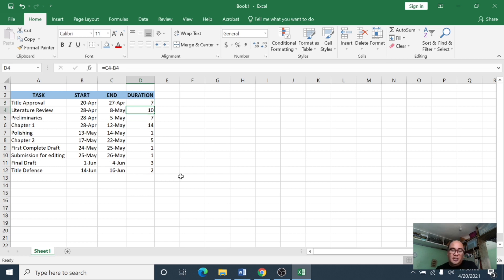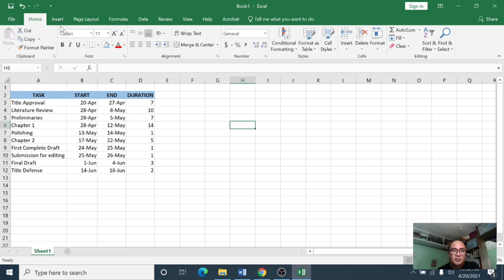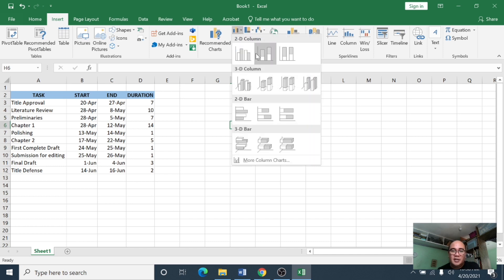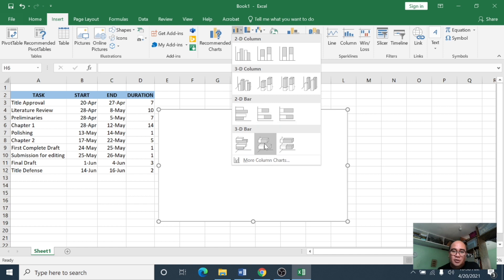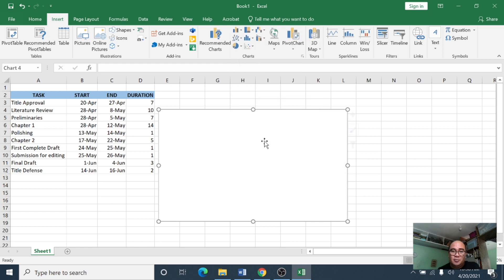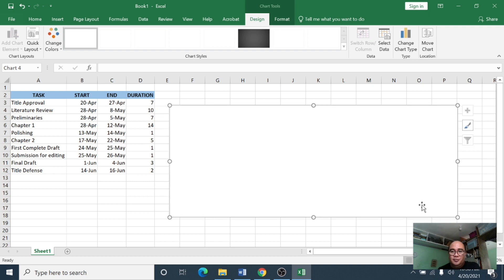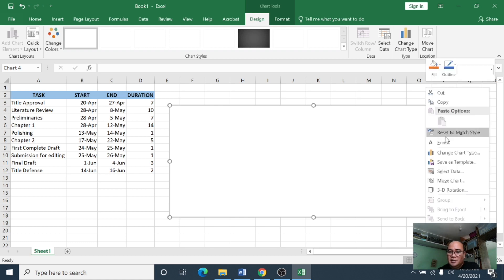Now we are ready to start creating the Gantt chart using this data. To start creating a chart, simply click Insert and then in the chart group select either the 2D bar or the 3D bar. For this example I'm going to choose the 3D bar — simply click it. The first thing you then need to do is insert the data you're going to use by right-clicking on the chart area and selecting data.